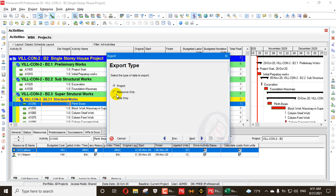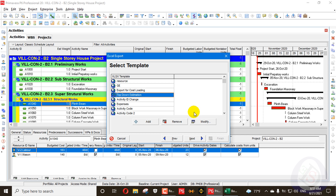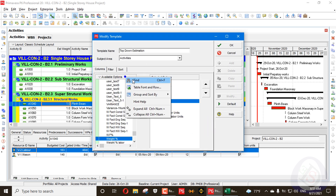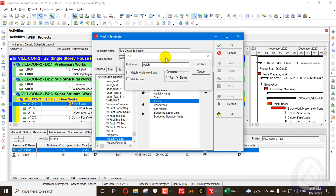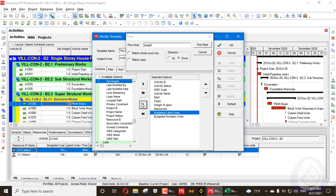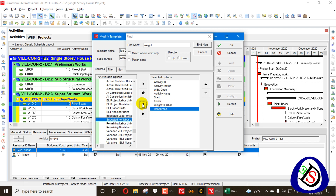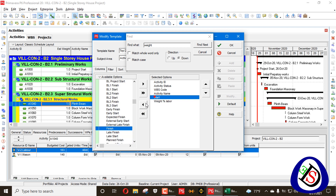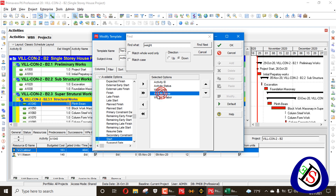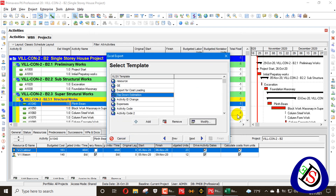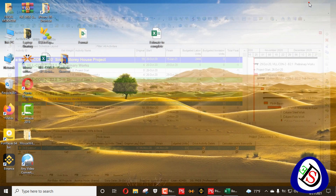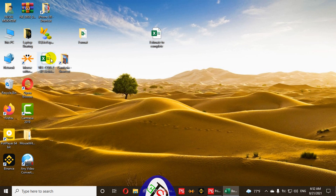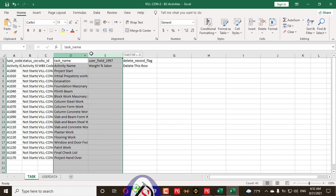I'll redo the top-down estimation export — modify the template and add the 'Weight Percent Labor' column. I only need activity name and weight percent labor — no start, no finish, no other columns. Press OK, then Next, Next, Finish. The 'Weight Percent Labor' column is now exported. I'll open that XLS file.